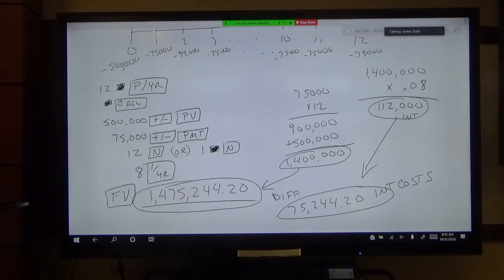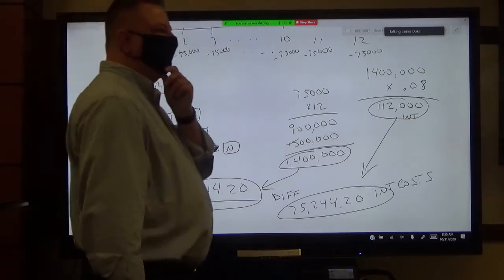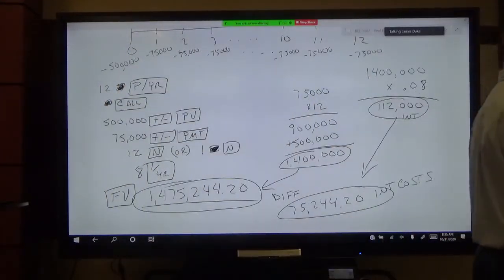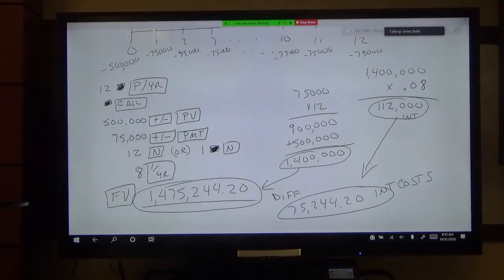In that $75,000, the only cost that's really affecting the contractor every month is the cost that he absolutely positively has to pay every month, or even every week, which is your labor costs and your cost of insurance and so forth. So really in that 75,000, it may only represent maybe, let's say $15,000, $20,000 per month of cost that he absolutely has to pay every month.